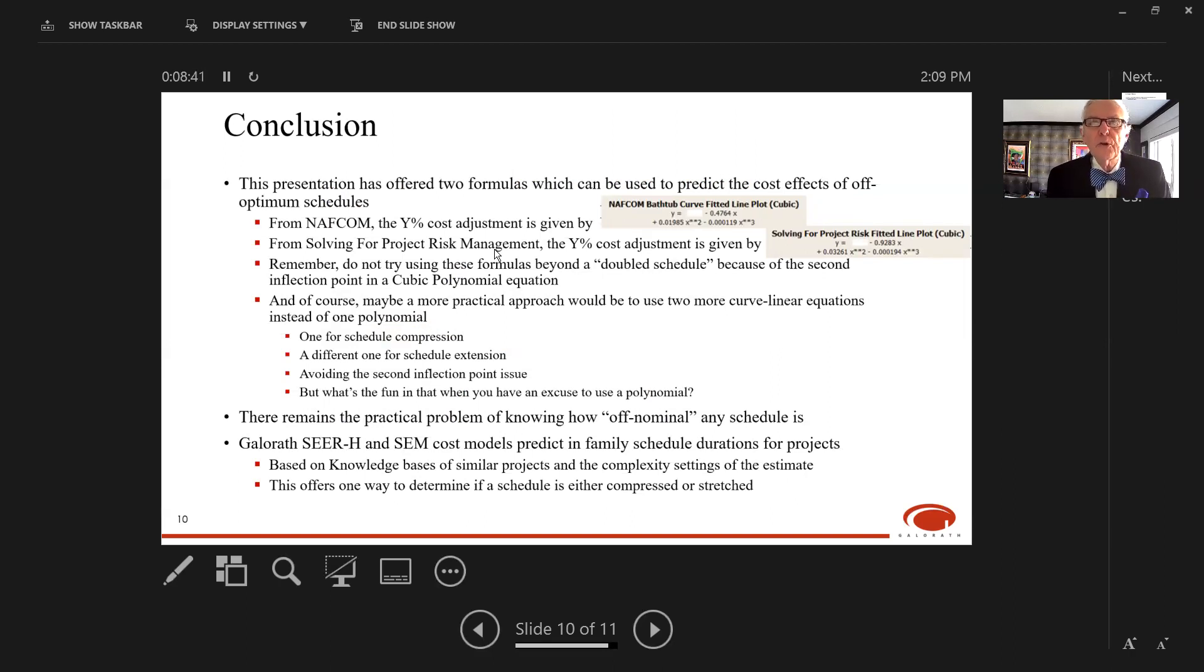This presentation has offered two formulas which can be used to predict the cost impacts of off-optimum schedules—one from NAFCOM and one from the project risk management book. Remember, don't try to use these formulas beyond a double schedule because each has a second inflection point due to the cubic polynomials. That's beyond the range of applicability for these formulas.